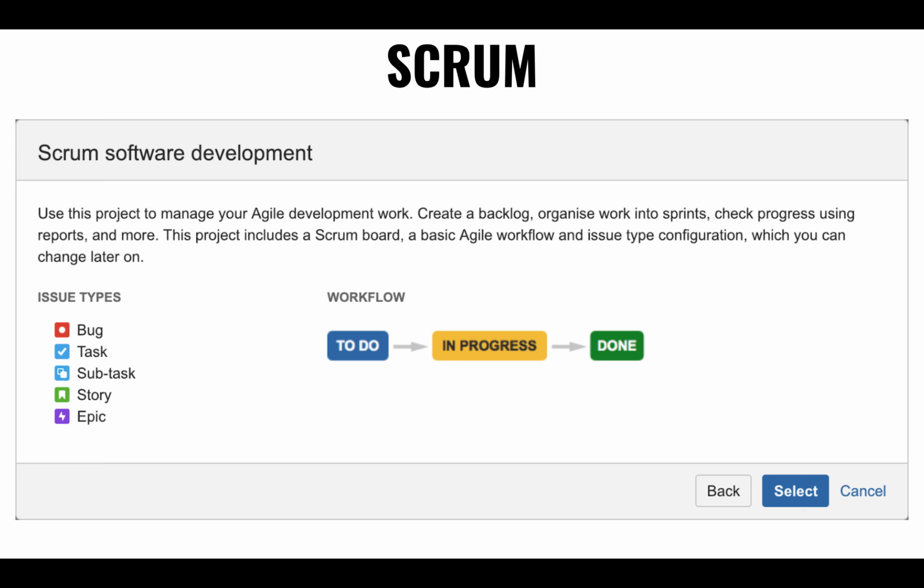And then once they're happy with it, they will close it and move it over to done, or if they find something wrong, they might move it back into progress for you to fix something. Ideally, as the sprint progresses, the developer is responsible for moving things from to do to in progress, and then to done, and so on and so forth. And at the end of the sprint, hopefully everything will have gone through, and everything will be in the done column, and you'll be ready for the sprint planning for the next sprint.